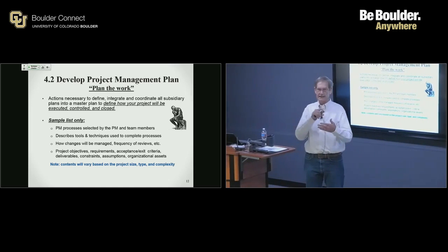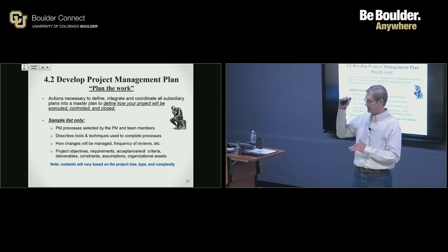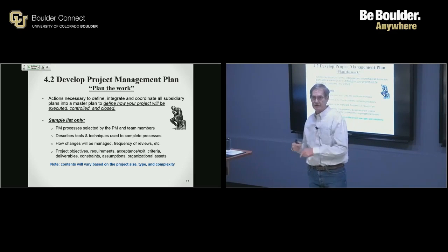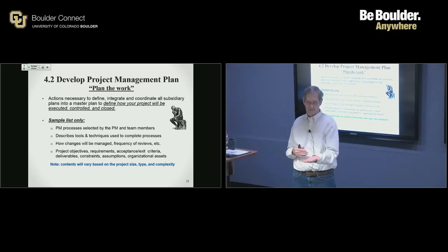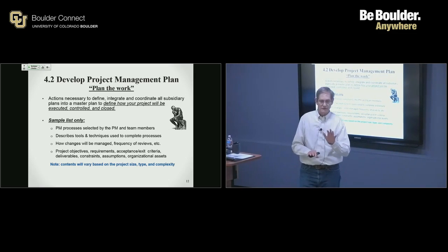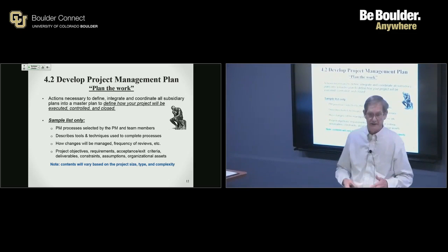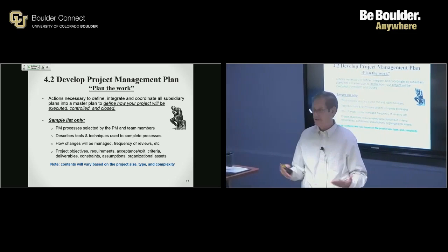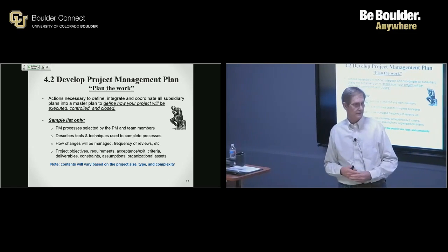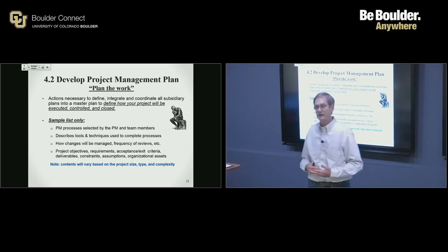But basically, I had hyperlinks. And my good friend, Dr. Gary Evans, that's how he builds a plan document. It's a series of links to other documents, to the charter, to the work breakdown structure, to the risk plan. And so I walked them through the 4-page series of hyperlinks that I popped up on my computer and said, here's my plan document, here's my charter, here's my risk management plan. And so at the end of the audit, they said, well, no findings. They said, you've got a plan and you're working the plan. They were able to go out and look at some of the documents that we had developed and that we're tracking along the way.